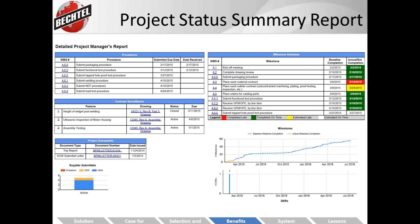Great, great. Another follow-up question about length of time. How long was the design phase in particular? For the new system that we're standing up right now, we started designing it at the end of April 2014, and we finished that the first week in July. And again, that's to accommodate over 1,400 users and 13 different departments. So it's a very extensive design document, on the order of 1,100 pages worth of configuration settings. So we did that pretty quickly. That was with a team of about 4 or 5 individuals representing all those different units.